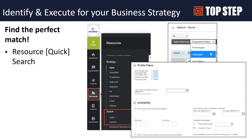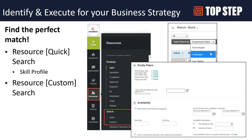There are a few different search options. The quick search basically lets you show everyone who is an expert in Java and lives in the US — you pick those profile items, click save, and it gives you a list of everyone showing who has availability and who is scheduled. The custom search is a more in-depth search that allows you to filter by technologies or however your profile is set up, and also factor in availability — for example, looking for someone between a specific date range that has 40 hours available. It will look at all other bookings, scheduled items, or time off, and return a list of folks who meet the criteria with the best fit from an availability perspective.